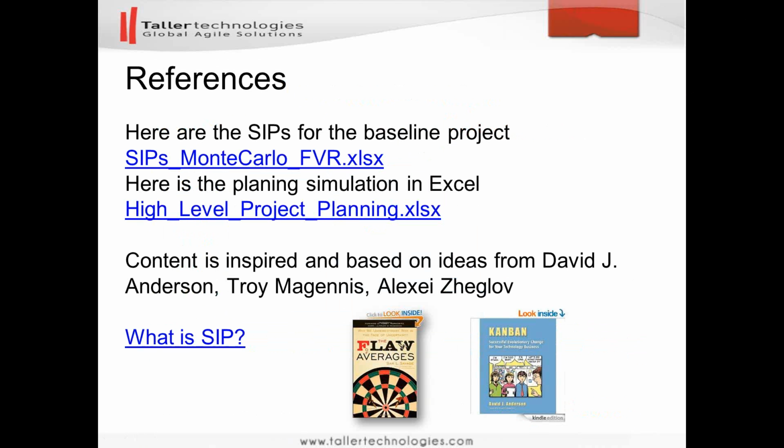So we thought that it was a new technology. It was really new technology, and we thought that the learning curve would not be that steep, right? And the team would embrace technology much faster than was actually the case. So it was a decision that we made, and it ended up being a wrong decision. The technology was a bit more difficult to learn, and because the first leg of the Z curve took longer than expected, everything else was longer.